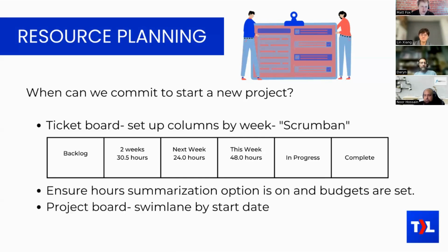Good question. So there's a couple of ways you might do that. One is if the project is simple, this is harder if it's actually a really complex project. But sometimes some of the projects are simple enough that you can just keep that in your head. Okay, I know that this ticket needs to be done before this other one, and so I'm gonna keep this other ticket that can't be started yet in the backlog until this other ticket has gotten through to in progress and complete. And only when it's fairly well done in progress or complete, only then am I going to drag this ticket out of the backlog into the ready column or into one of these time-based columns here. Okay, so that's one way to do it.